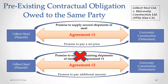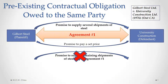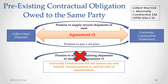The court found that the promise to supply the remaining shipments under agreement number two was not valid consideration, because that promise had already been made under agreement number one, and University Construction did not receive any new benefit from that promise to supply the remaining shipments. Therefore, that second contract, agreement number two, is void for lack of consideration.